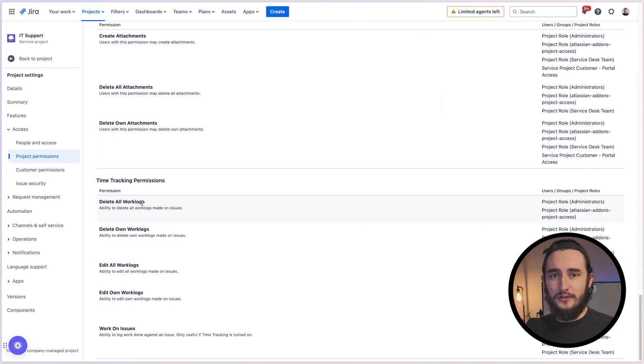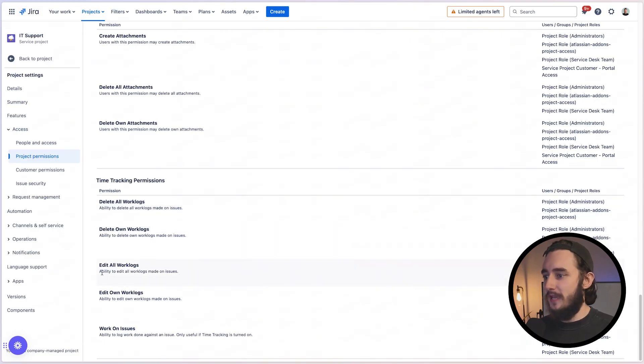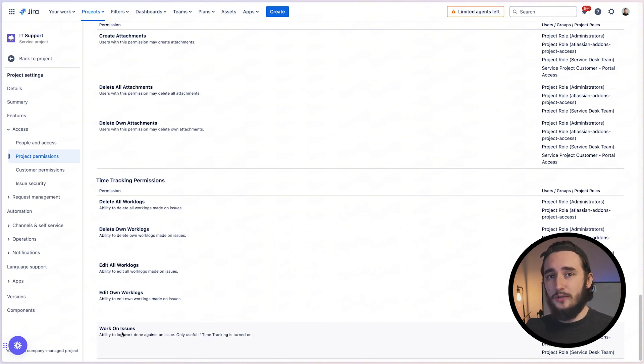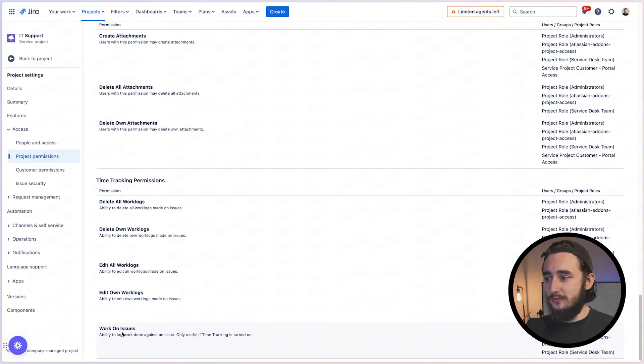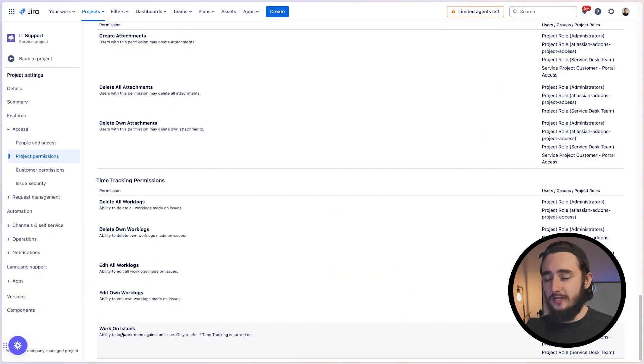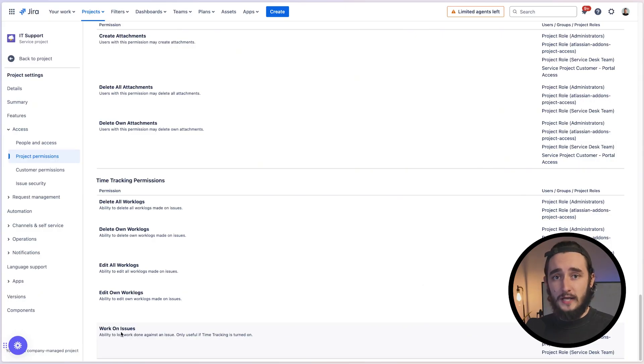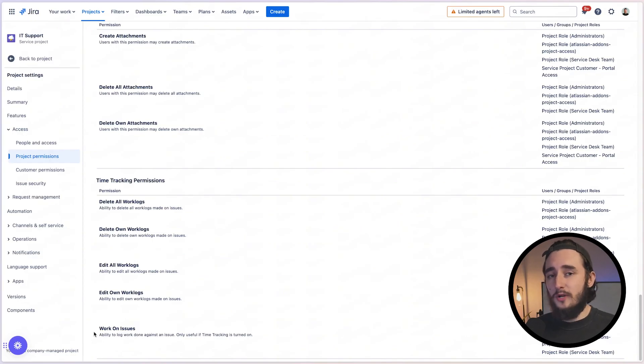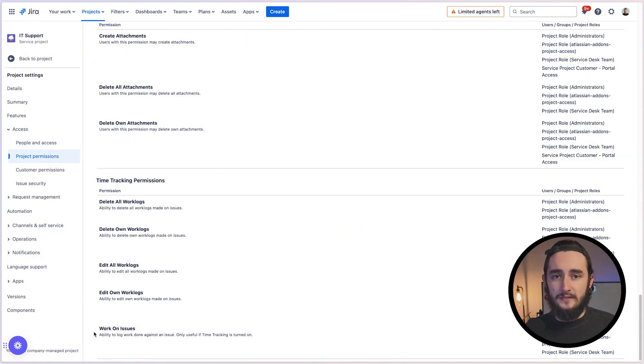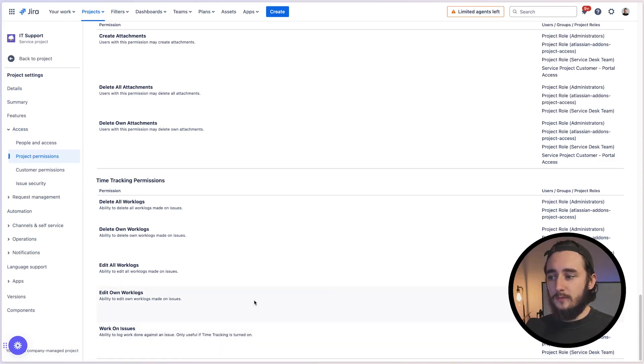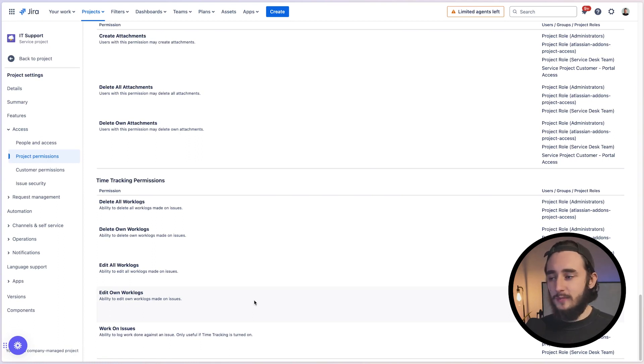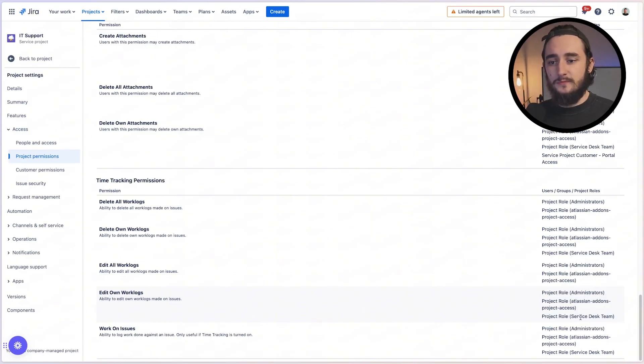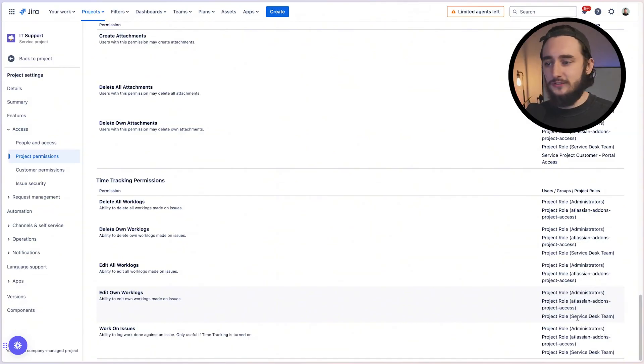Here are all the permissions. Delete all work logs, delete own work logs, edit all work logs, edit own work logs, and work on issues. So depending on how you want to structure this, you could give the admins of the project abilities to delete and edit all work logs. That way they could go in and manage on behalf of other users in case changes need to be made. Or you could also just disable them entirely and have them be unavailable. Here's what I would suggest. I'll start from the bottom here since those are going to be the most common that you're going to want to assign. Work on issues or soon to be work items, you're going to want to make sure that everybody has access to this. This is actually going to give them the ability to track the time. So if I look on the right side, this is assigned to admins and service desk team. Edit own work log. This is good to have available for everyone as well in case somebody makes a mistake or needs to go back and edit some hours that they didn't quite complete correctly. Again, this is assigned to administrators and all service desk team members.